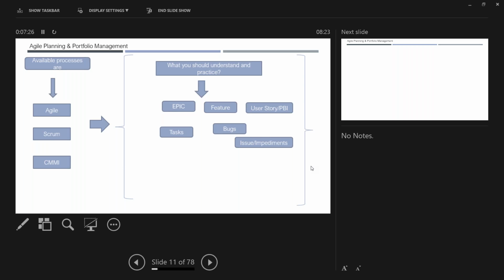Now if I take a developer with 1-2 years of experience, he doesn't really know, or doesn't really have experience of the complete life cycle of working with a payment gateway. Let us say applying some encryption standards on your credit card, debit card numbers, or connecting to your ICICI bank. That is one thing. And getting the data back from the ICICI bank, authentication. There are a number of sub activities involved, right? You call them tasks. So this is the place where a developer takes and works on a task. Each task is an individual activity. So this is how your Epic, feature, user story, and tasks are related with each other.